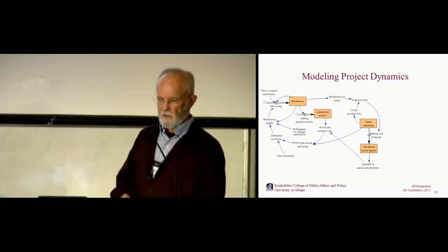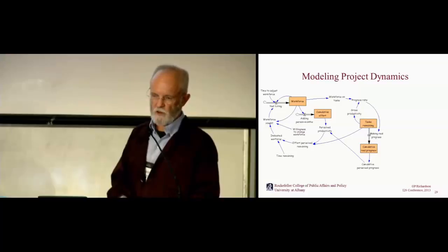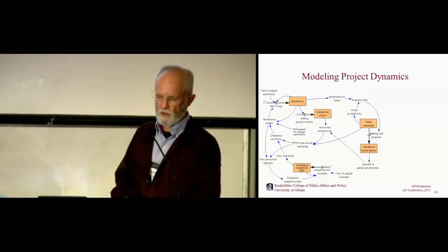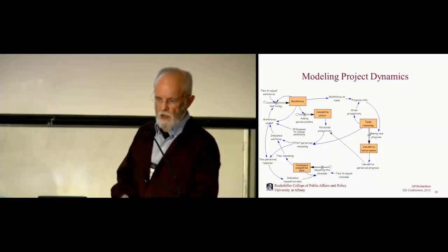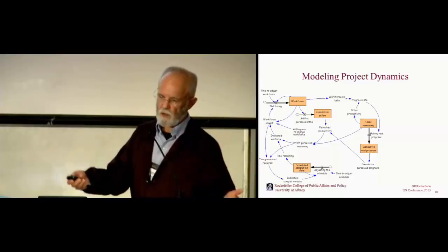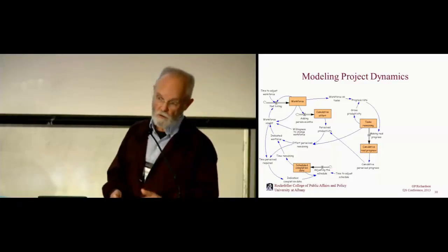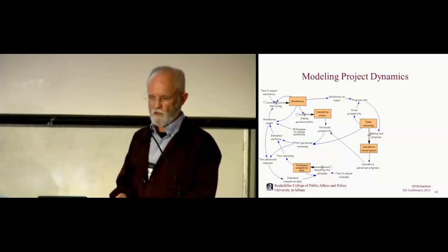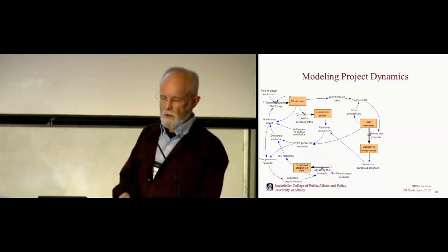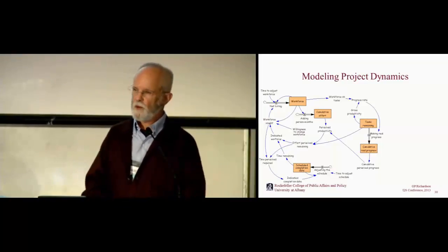And you can use that information to tell you how productive the workers are, and that helps you figure out the number of person months of effort remaining. And you can use the person months of effort remaining to tell you whether you need to slip the schedule or not. And so there's an endogenous component in this little structure for slipping the schedule. Or, well, that's what happens in complex projects, but yes, I suppose you could shorten the schedule as well. And if this were all there were in complex projects, there wouldn't be a problem.